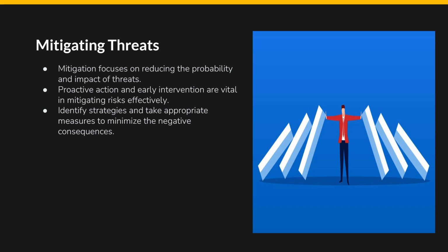A project manager anticipates the risk of scope creep, unauthorized changes or additions to the project's scope. To mitigate this risk, the project manager establishes a robust change control process that requires any scope changes to be documented, reviewed, and approved by stakeholders. This helps prevent uncontrolled scope changes and ensures that changes are aligned with project objectives.